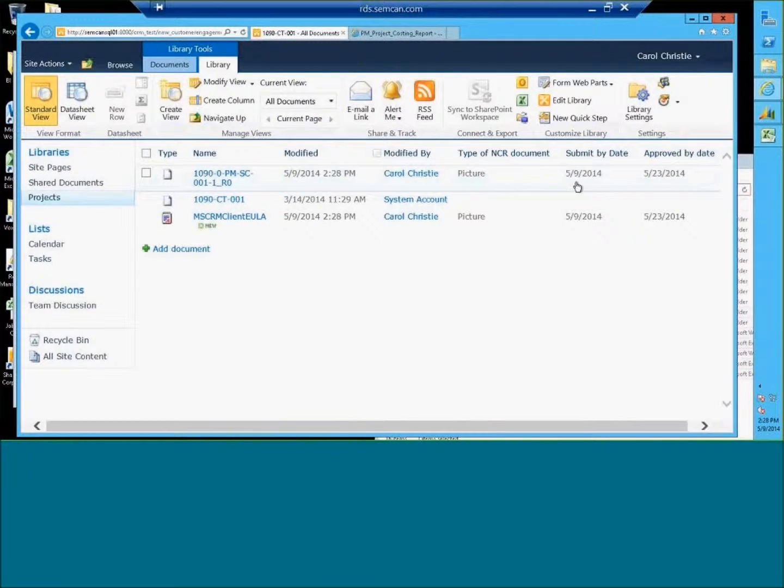You might call it best practice. Sometimes I put another field for a synopsis or an abstract of the document itself. Sometimes people don't want to open up the document, so you might want to have another column off to the side that briefly describes what's in the document, so you don't have to click on it. I'm picturing this like our document register, where the folder becomes a document register.